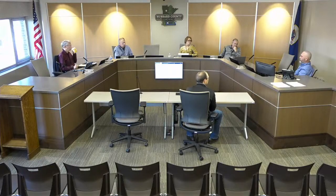We are also, with the moving of the power lines out here, going to have to do a cutover. You're aware of this, aren't you? Yep, you mentioned that to me. Next Thursday night, Minnesota Power is going to do the cutover to the new power lines and abandon the overhead power lines, as I understand it. And I authorized them to work overnight to do it, so that we don't have to shut the courthouse down for a day. They're talking about a 4 to 6 hour